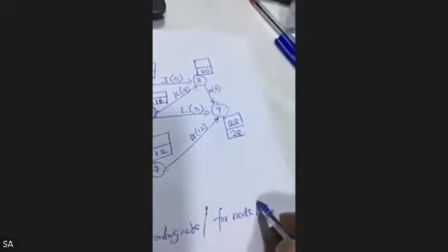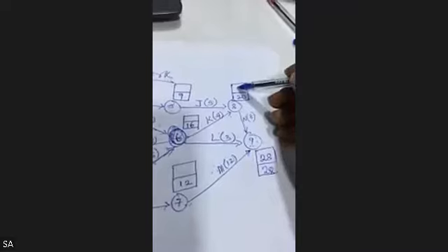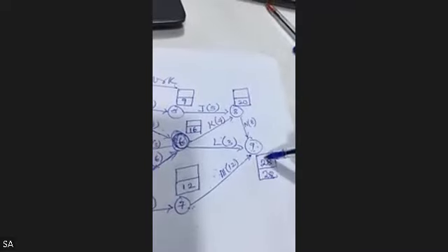That becomes 28. For node 8, if I want to get this part, it will be 28 minus 8. So that gives me 20. Take note too, if there are any other arrow that point to 8, I will have to consider the minimum value. So 28 minus 8, I have 20. Then I'm going to node 7.